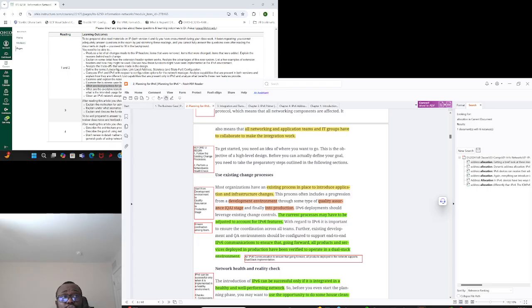Also, this is very key when it comes to the change management process. You need to communicate that once you begin this process, all new changes that come to your network must have IPv6 ready, and not that you deploy IPv4 and IPv6 at the same time, because you would be increasing your workload on IPv4 at the same time as IPv6. So as much as possible, you want to leverage IPv6 more than IPv4. For future changes, if possible, support IPv6. Go for it rather than deploy IPv4 only and later have to solve the service into IPv6, right?